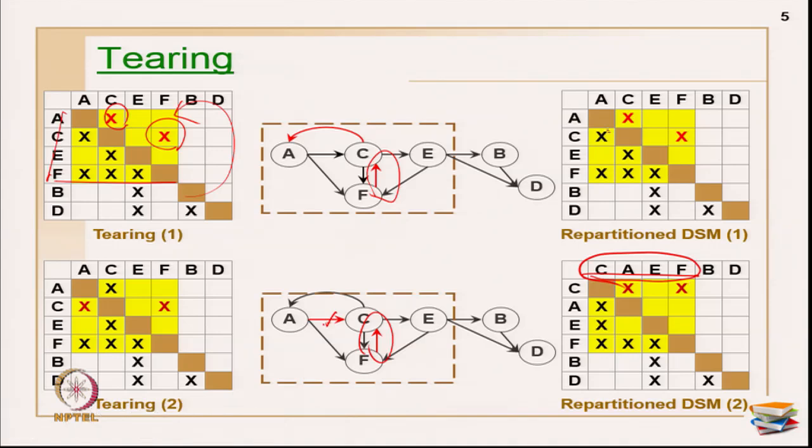So, go through this, plot your durations along the diagonals, and add values along this, primarily the rework probability: what is the percentage of rework, or what is the probability that a change in activity A affects activity C, so that you may have to redo it. Then see what is the duration for this entire project if I go through this particular sequence of project execution. You have to cross check that, and then you choose the tear marks and go ahead.